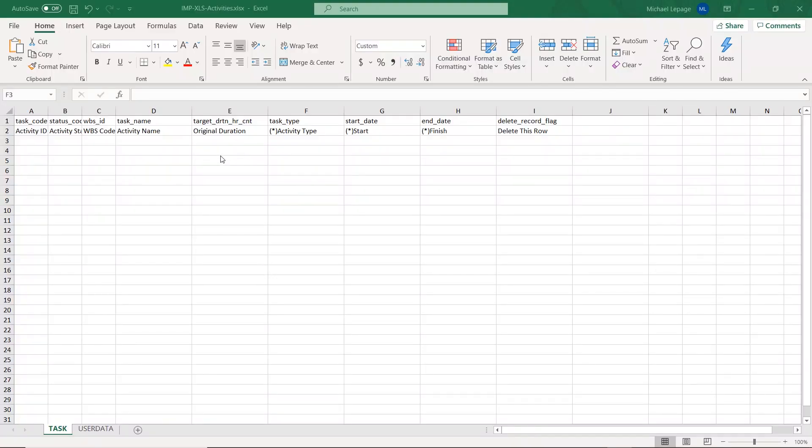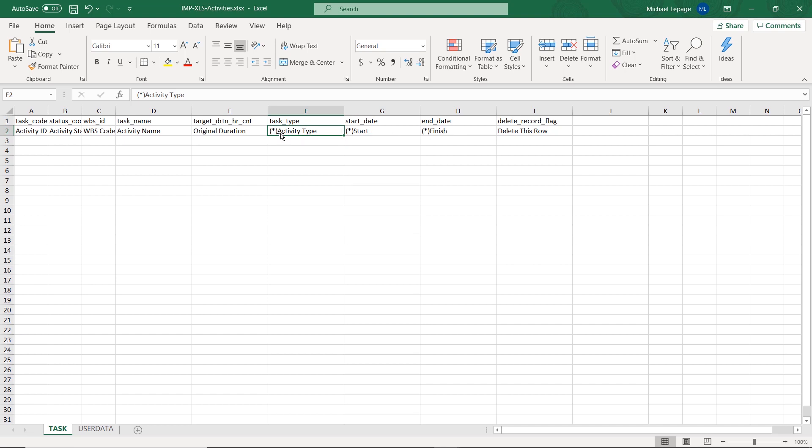Just to prove that to you, if you look at this import template that I generated from Primavera P6, you'll notice that activity type column has an asterisk on it. Any columns that have asterisks on them cannot be imported. That means you can't set that column's value and import that information into Excel. I'm sorry, it just does not work.